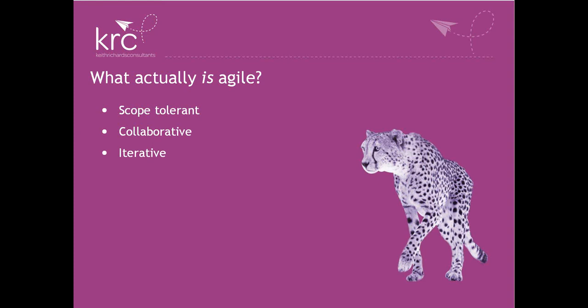Agile is inherently iterative. You'll often see loops being drawn when we're talking about Agile, the idea of going around, learning, adapting. The secret's not to go around too much. And if you go around something 3 times, refine it, I think you'll be in a good place. If you're on iteration 10, 11, 12 of the same idea, it either means you're gold plating or it means you've set out not really knowing what you're trying to do.